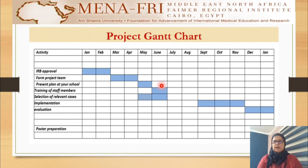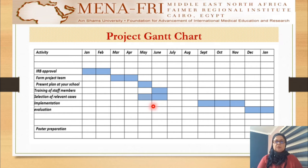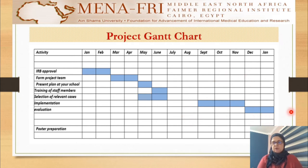This is my project Gantt chart. IRB approval was taken, formulation of the project team already done, presentation of the plan to the college and the training of staff members done, selection of relevant cases was done and approved from the college board. I actually went faster than the proposed Gantt chart, already through the implementation phase and evaluation that were supposed to be done during the period from September 2021 to January 2022.